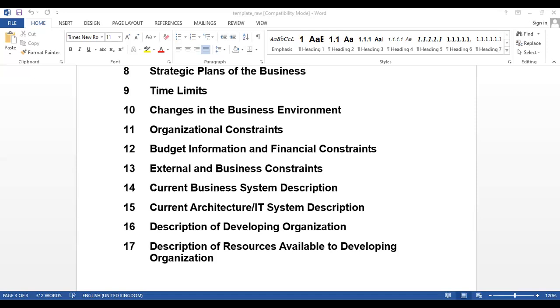Statement of work title, project request, project description, management approach, scope, responsibilities, acceptance criteria and procedures, project plan, schedule of the project. All this will be part of it. Also, it has to be signed by the client. Got it?